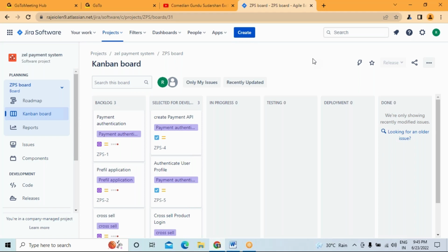Whenever you are planning, unless you do the velocity, how many weeks do we have? 16. 16 minus 4, we hardly have only 12 weeks. Within the 12 weeks, whatever leftover user stories or story points we have decided, plus the balance user stories not completed in the first and second sprints, all this has to be completed within the stipulated time of the release plan we have planned. In order to know about the predictability, these velocity reports and all will be created. Agreed? Yes, sir.